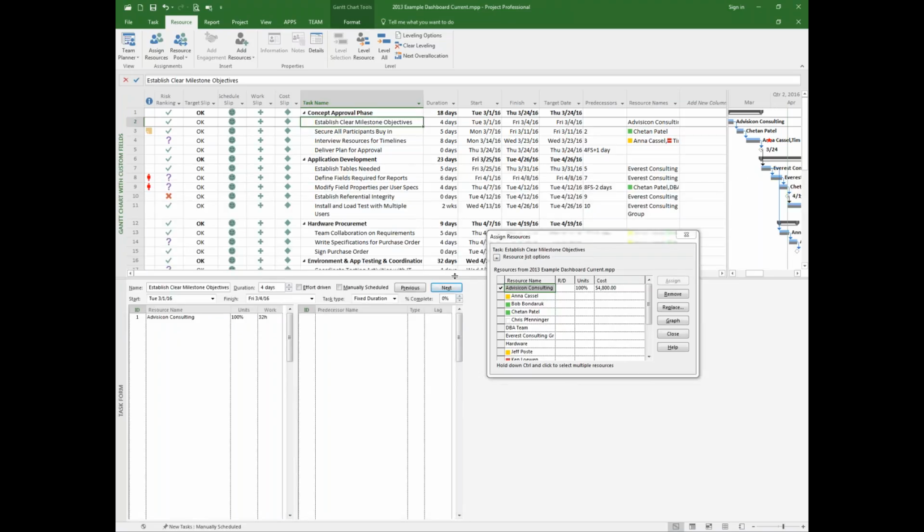Now, if you're moving to Project 2016 and dealing with Project Online, you're going to see something called resource engagements, which is the ability to make a request for a resource and have a dialogue with somebody who can say who's actually going to do the work and assign it. That's very similar to what you're going to find in Visual Studio: if we push these tasks in there, in Visual Studio we can assign who is really doing the work, or maybe swap one resource for another. The PM may not know that. So Shane, do you want to talk a little bit about it from the Visual Studio side of things? If you want, share your screen, I'll make you presenter again.